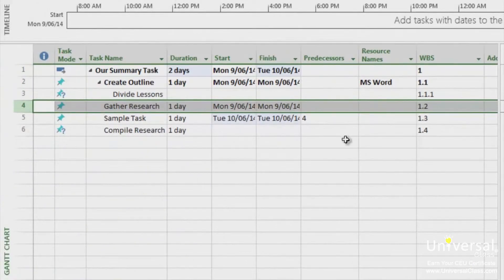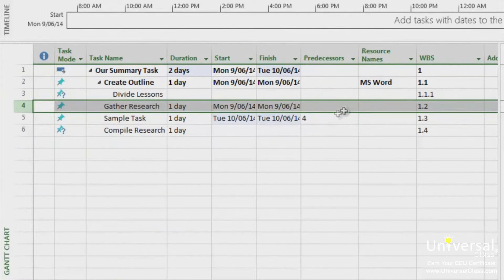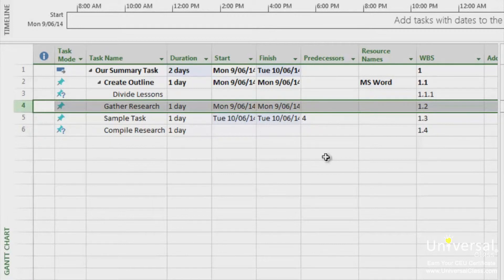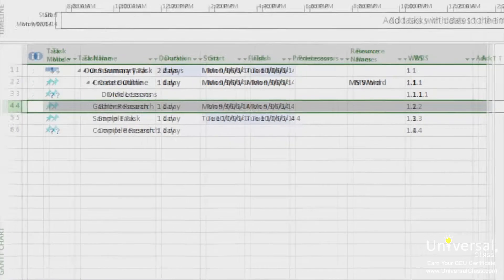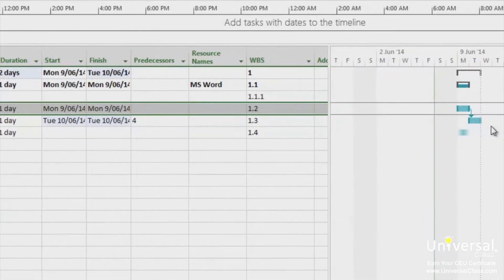You'll also note that the successor task has the number of the predecessor task in the predecessor column. In this case, in task number five, you have the id of task number four because that's what comes before it. There's also an arrow showing the relationship between the tasks, as you can see on the right of the page.